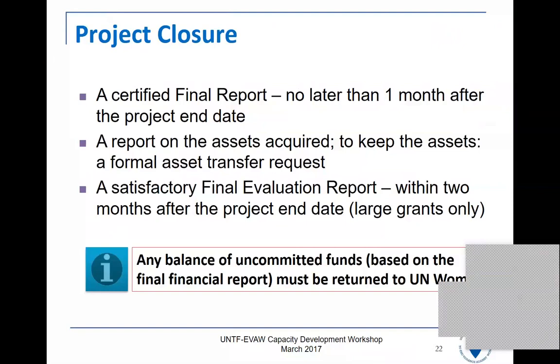Until the project ends, those assets are owned, in theory, by the UN Trust Fund, but we will transfer formally the assets to your ownership at the end of the project through an asset transfer request. So if you were purchasing assets such as major pieces of equipment, you will need to keep a record of that. And the final payment is also subject, for large grantees only, to a satisfactory final evaluation report. So do remember that the final payment is subject to receiving that evaluation report, and that's due within 2 months after the end of the project.